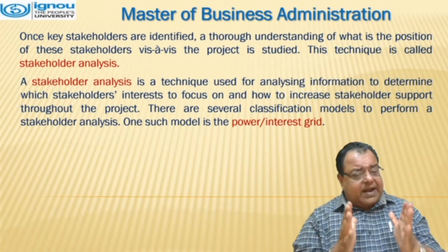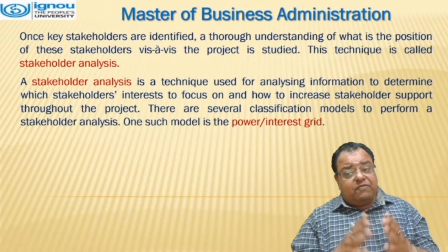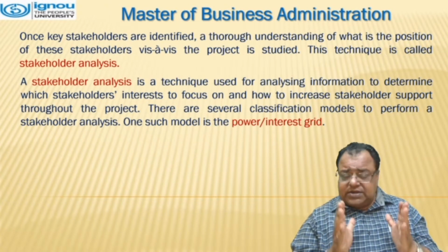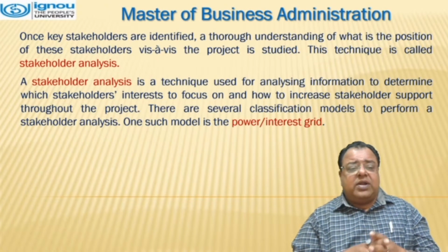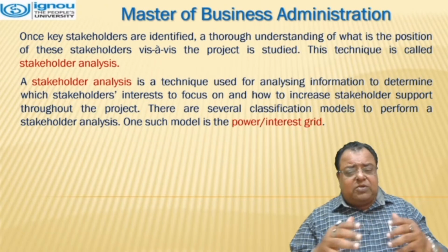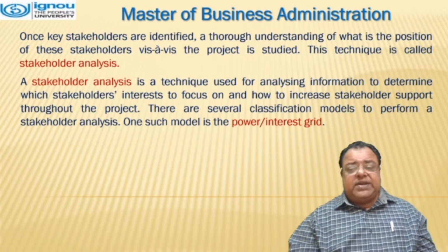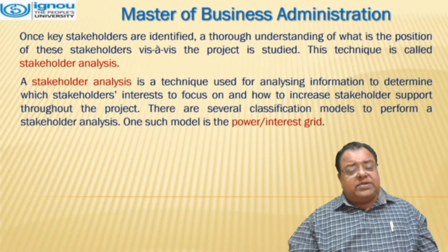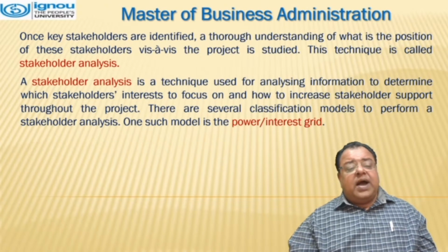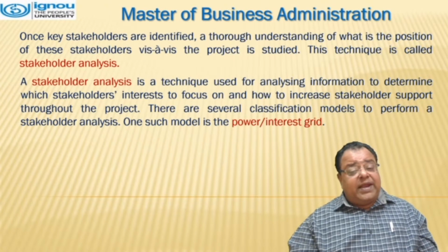Once key stakeholders are identified, a thorough understanding of the position of these stakeholders vis-a-vis the project is studied. This technique is called stakeholder analysis. A stakeholder analysis is a technique used for analyzing information to determine which stakeholders' interest to focus on and how to increase stakeholders' support throughout the project. There are several classification models to perform a stakeholder analysis. One such model is the power interest grid.